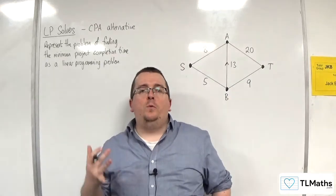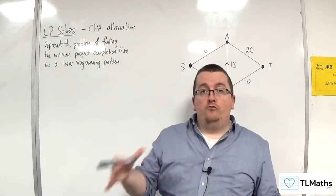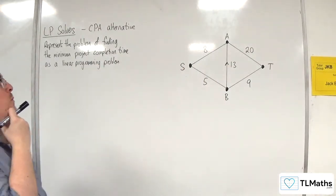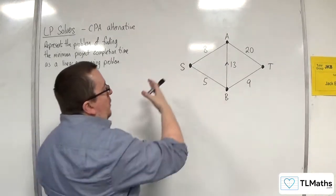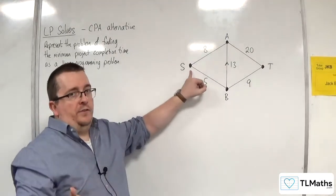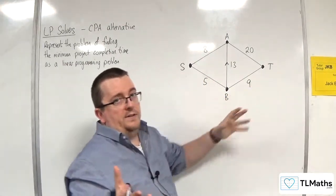When we do critical path analysis, you are essentially finding the longest path through the network. Let's say we wanted to do critical path analysis on this network here, where S is the first event and T is the final event.